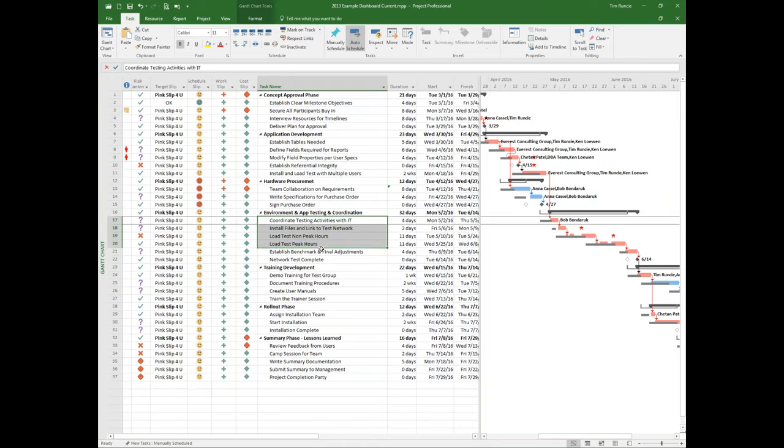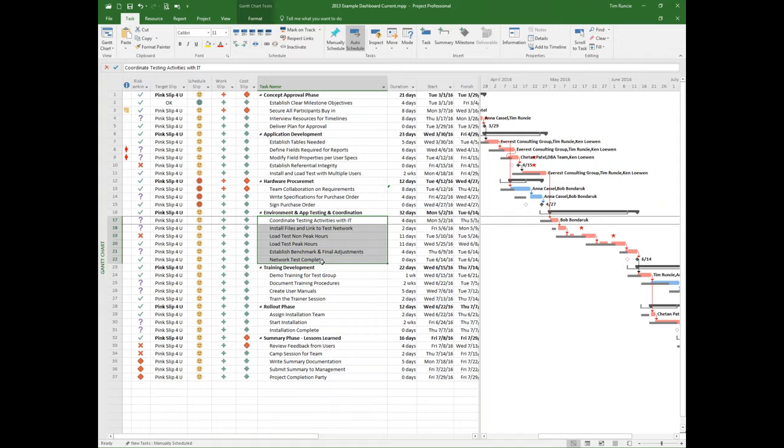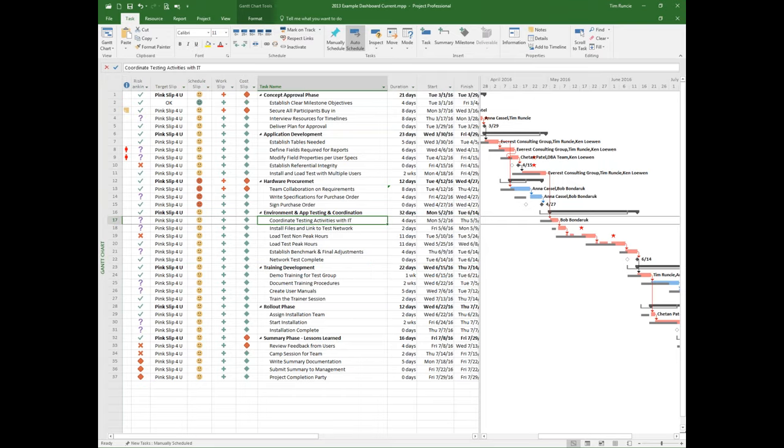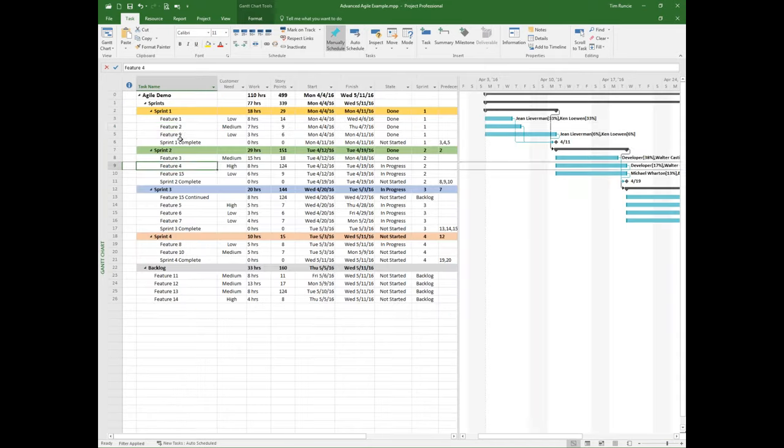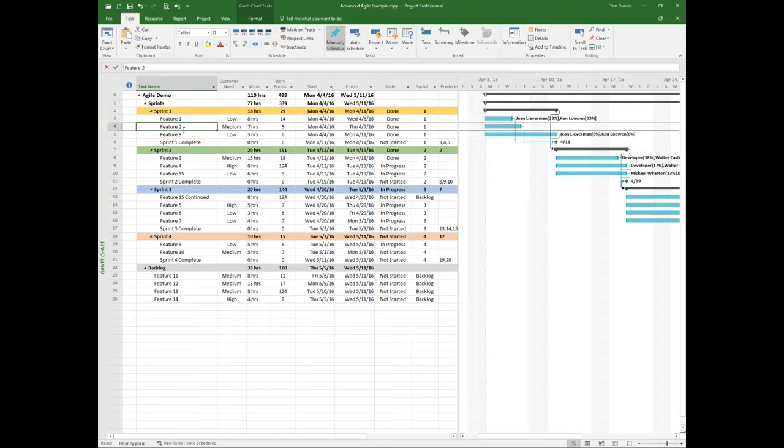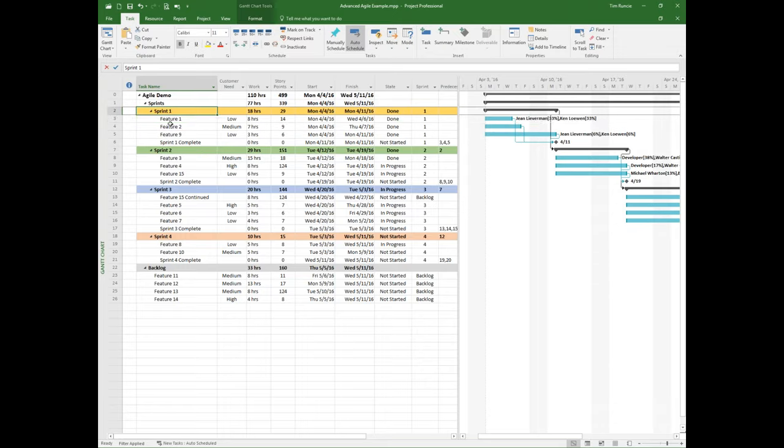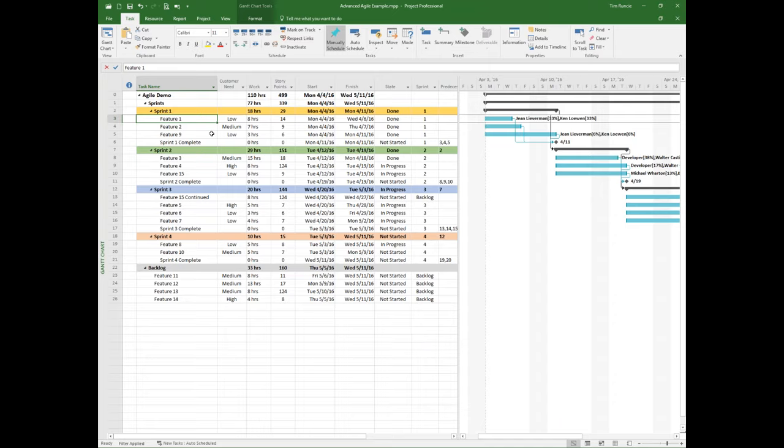But a lot of times we get down to a section here, perhaps, that might be development. And you might have test, build, test, deploy. And you might have a series of 30%, 50%, 90% design releases. Or you might be working on a release schedule around some of the activities. And so at a high level, in many cases, project managers don't want to put all the sub details. They might be breaking something directly out into a sprint. So what I put together is a template that just says, why don't we take the database and we're going to organize information in terms of sprints.